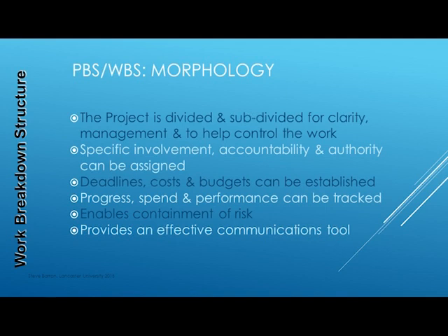The WBS shows what product and deliverable is served by an activity, and via the network, what are the interconnections between activities, how an output from one activity feeds into another activity, and which activities can be completed in parallel or independently of each other. Therefore, much project information can be communicated through the WBS.